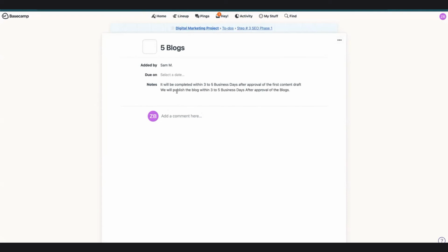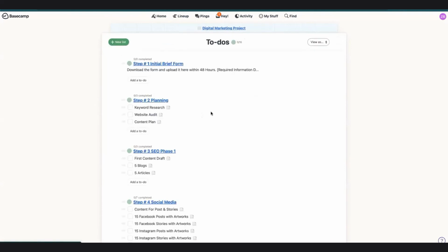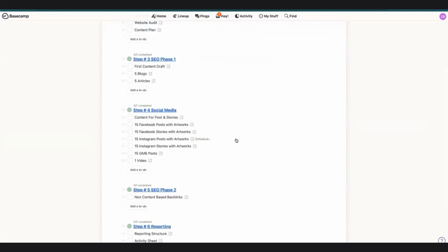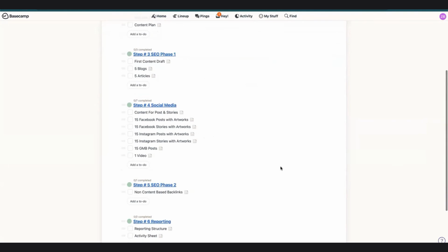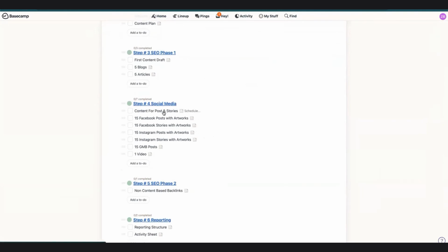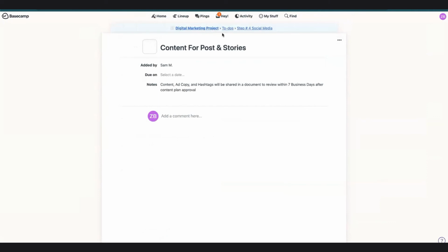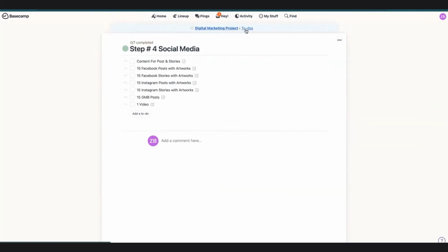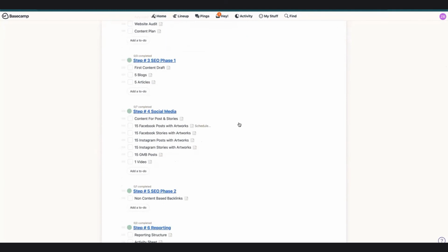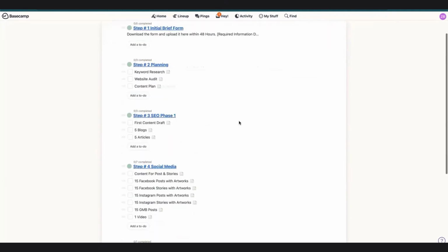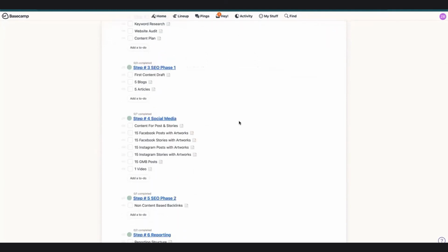Blogs. Now we're going to start writing the blogs. We'll complete them within 3 to 5 business days after the approval of the first content draft. We will publish the blog within 3 to 5 business days after the approval of the blogs. So what I'm trying to say is that we are on point. We do everything by the book. Everything we do is timelines and deliverables. These are the deliverables. If you've noticed, in these to-dos, this is an actual customized campaign that we're going to start for a client.